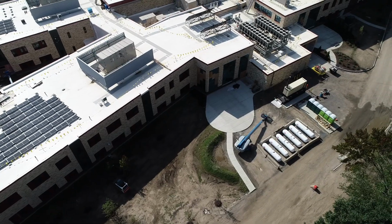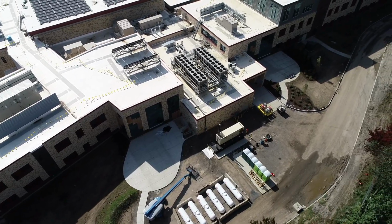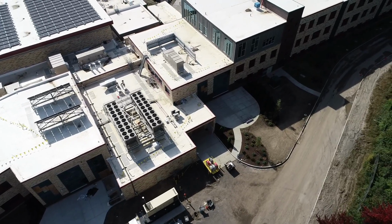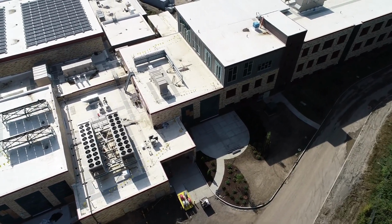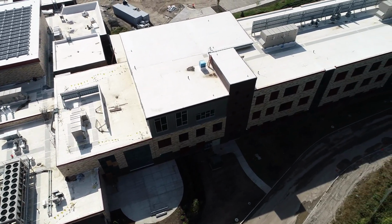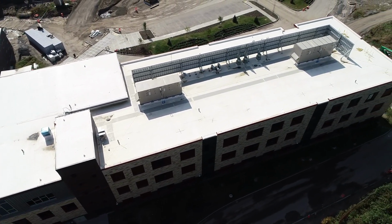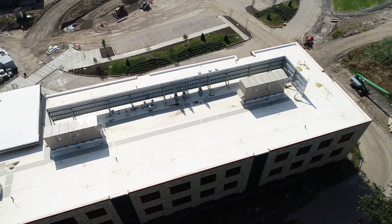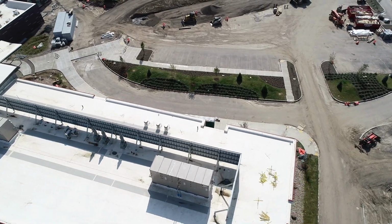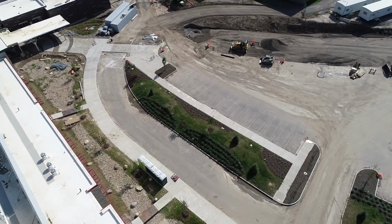As we said in the beginning, the goal is to have the students for 5th grade through 8th grade in the building by January. That's right, and everything's on schedule right now. The construction on those portions should be done by the end of this month. November 1st will be their substantial completion date. Between November 1st and January 2nd, we'll be bringing furniture into the building and getting it ready for the kids. I think our next video will probably hold off until we've got some furniture in there and things are really moving along as we get close to getting the students in.